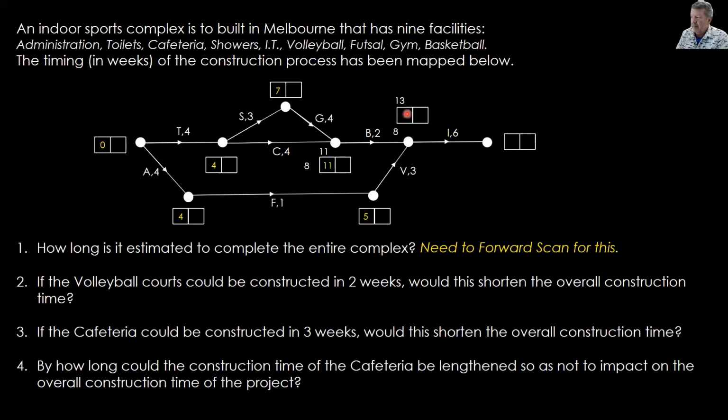Which is bigger? 13, obviously. 13 plus 6 is 19. So that gives us the whole project taking 19 weeks to complete. That's not bad for a sports centre.